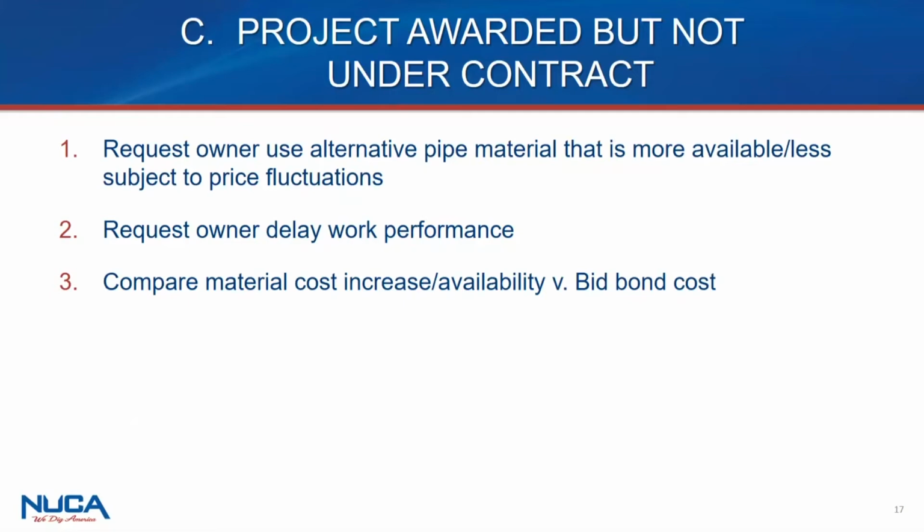Second one is, request the owner delay the work performance. And in fact, when I was looking at that one, I noted that the Texas DOT, in a memo that they wrote last month, themselves recognize that as an appropriate means to proceed: utilize delayed start provisions as necessary for contracts that require materials that are experiencing availability issues. So again, what's nice about that too is we have a recommendation from the DOT. So to the extent that you're looking to make that or other recommendations, you've got the support of what's already being recognized elsewhere as being suitable.